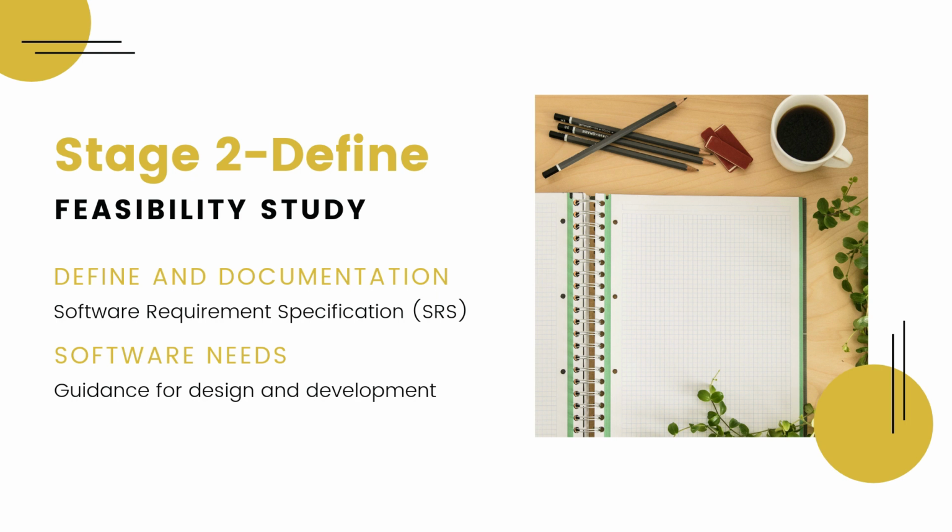In feasibility study, there are mainly 5 types of feasibility checks which should be taken into consideration. First is economic. In that, we have to ask question to ourselves, can we complete the project within the budget or not? Second is legal. Can we handle this project as cyber law and other regulatory framework or compliances?